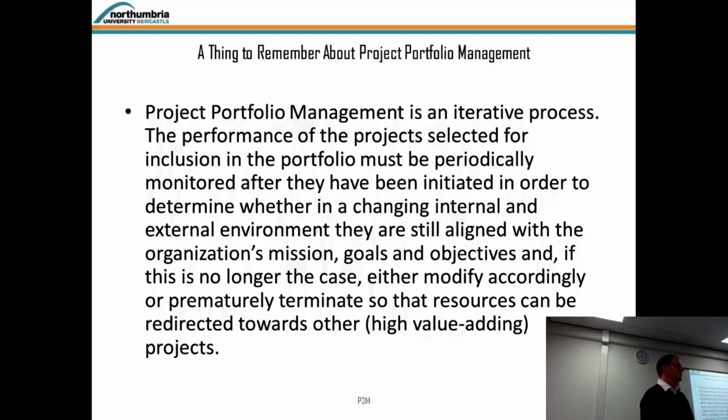Does that make sense? So you're deciding here as well about resourcing. You may still want to go ahead with it, but you're giving it fewer resources. That may impact, if you're a company working with other organizations, that may not be favorable to the other companies. But it may make a lot of business sense to you. Or it may explain why, when you're a company project manager working on a particular machine in your factory, suddenly it's like, oh, it's so difficult, we are running behind. And then if you count how many people are actually working on it, it's just one person, not the described three. So this is normally an indicator that it didn't make strategic sense for them to actually put the resources on it, for costing reasons.